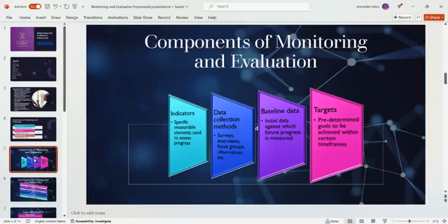So this baseline data helps us to build our indicators and our goals, because it says this is the information that is there. For me to move from here to here, while the baseline is saying this, I must use the baseline to say this is where I can go. I'm sitting at 82%. Maybe the target that is feasible for me is 85%. It cannot be 90%. That is the importance of baseline.